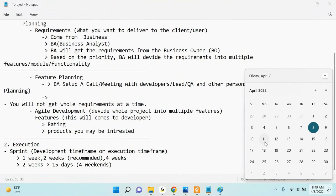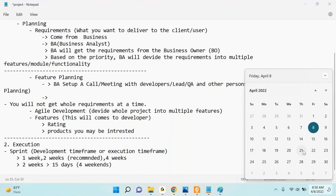Every day I have to work 6.5 hours dedicated to development - no meetings, no planning, just development. If you compare 6.5 hours times 10 days, you get 65 hours. You have to work 65 hours per sprint. This 65 hours we call your capacity. You have a capacity of 65 hours for the project in this sprint.